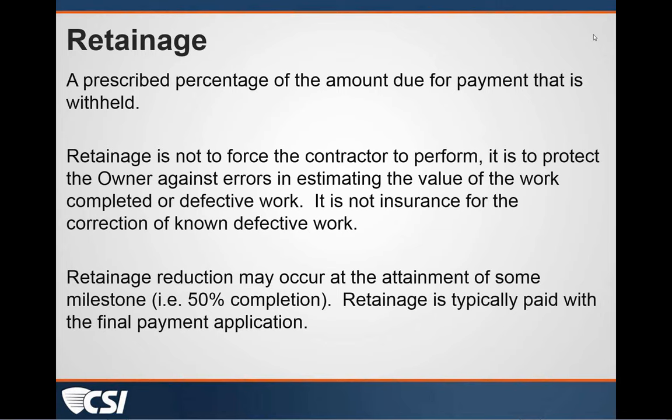Retainage is a percentage of the amount due that's withheld from the contractor's payment. Historically, I think typically it's been 10%. More recently, there have been some states, and I think the federal government as well, has reduced that to 5% on private projects. It can be whatever the parties agree to.